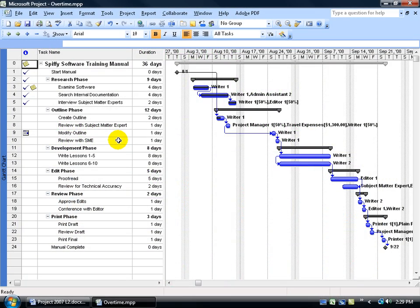Before we start learning how to enter in our overtime, we need to define what overtime is within our project. As you recall back in the level 1 training video when I set up my project calendar, I defined a working day as an 8 hour day. So anything over 8 hours would be overtime.